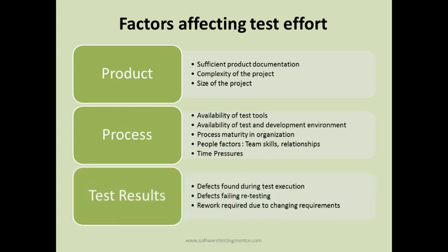Then the test results, meaning defects found during test execution. If many defects are found during test execution, it will extend the test effort. It will extend the test cycle. Then defects failing retesting: many defects are found, developers are fixing them and they are failing retest. In that case, it will again affect the test effort. More effort will be required to retest those defects.